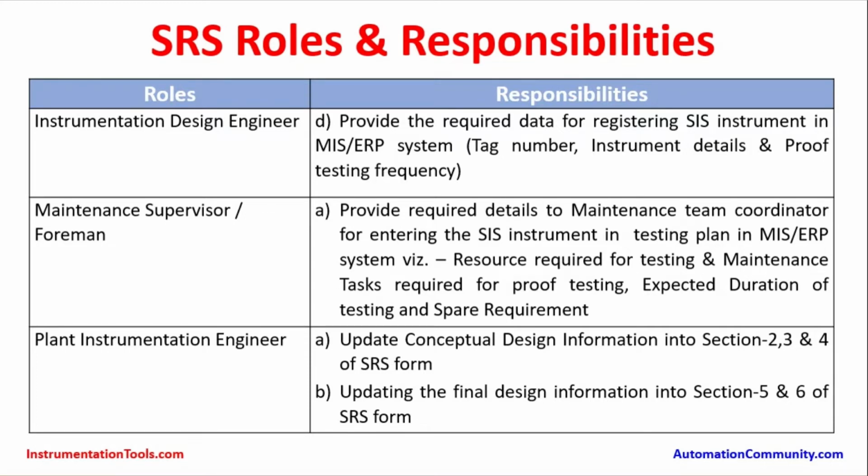So they have to identify the required resources exactly, and the task, as different roles have different tasks. Those have to be filled out, along with the tentative, expected duration of the testing, and if there are any spares required to be replaced for the instrument which is being tested, that also has to be included. Next one is plant instrumentation engineer.